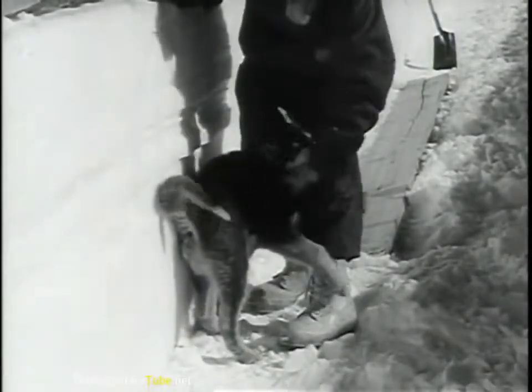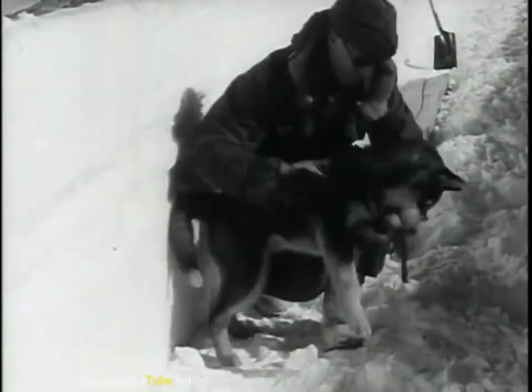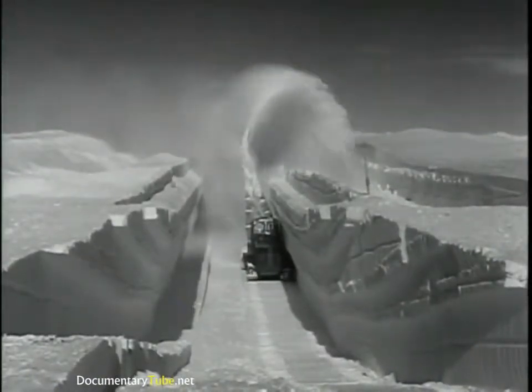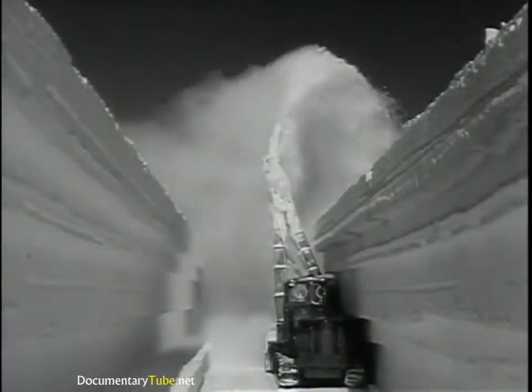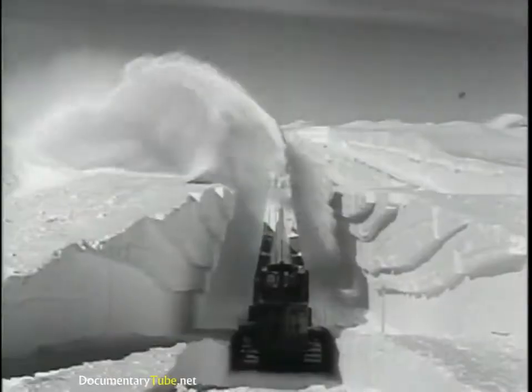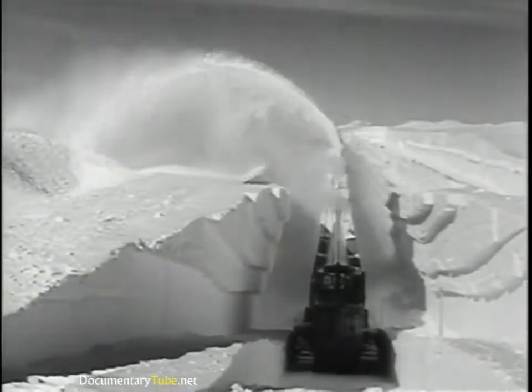Camp Century was starting to grow, and so was Muckluck. We used 3 Peter plows to cut all the different trenches we needed. By making a series of undercuts, the width of most of the lateral trenches was greater at the bottom than at the top. This cut down on the amount of roofing material required.